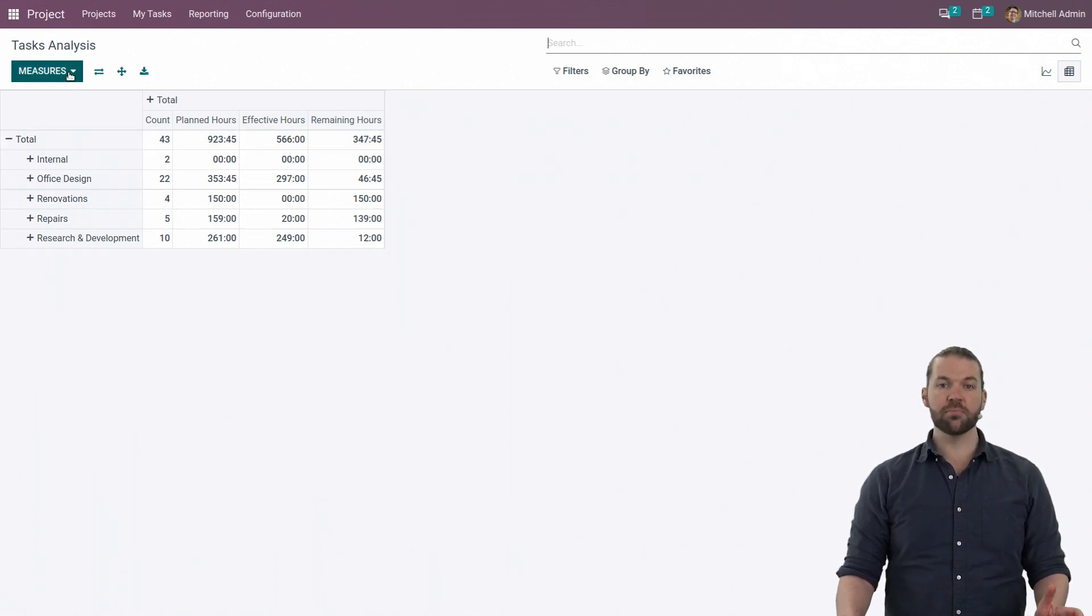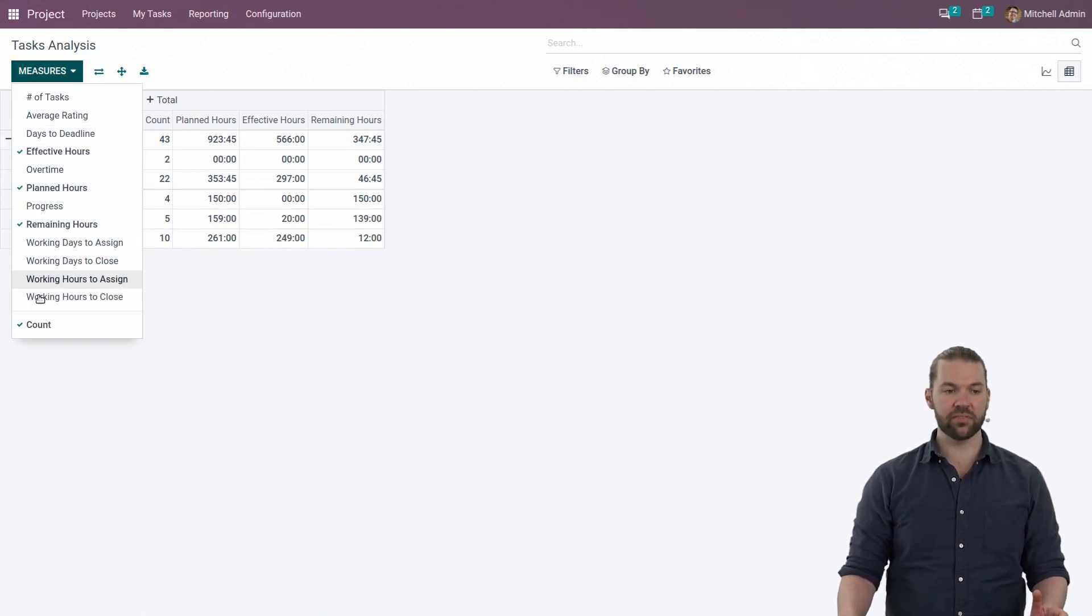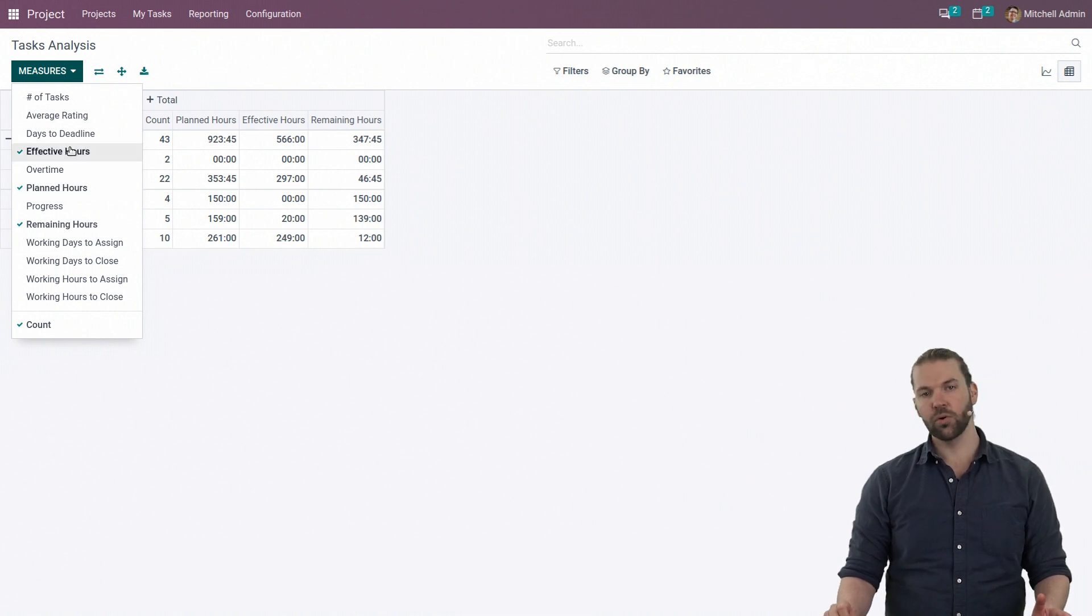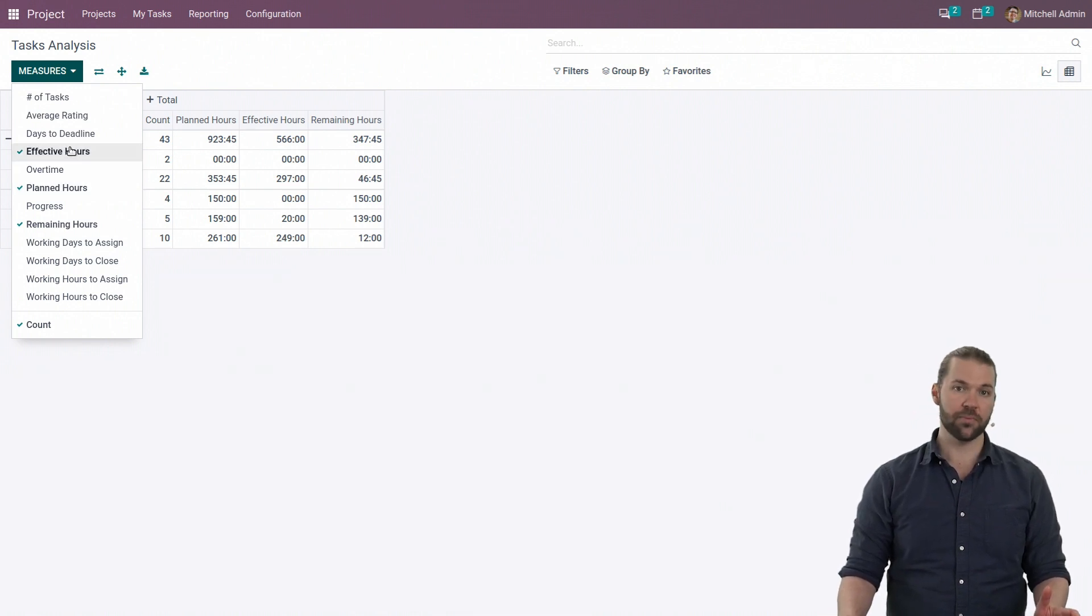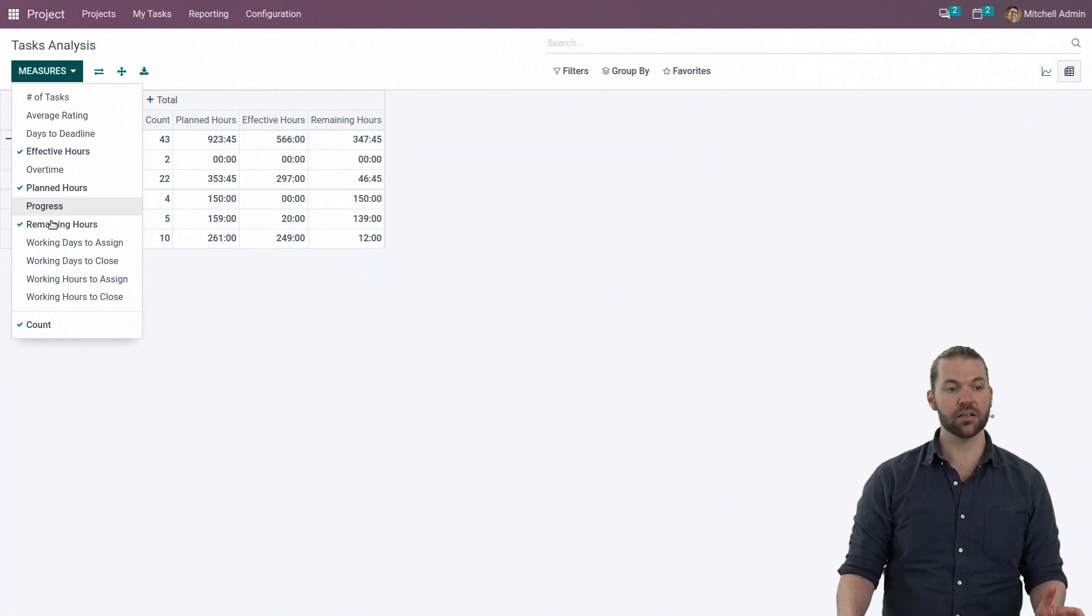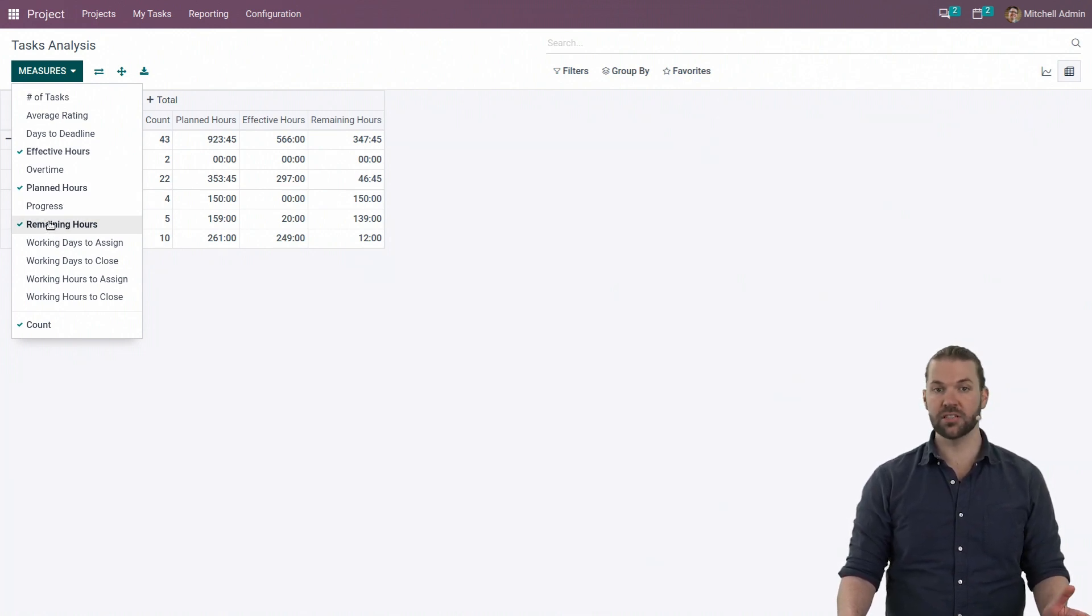First up is the measures. The measure will give us the information we're looking at. For example, effective hours, which will be the amount of time you've logged. We have the planned hours, which is the amount of time you're expected to work on a task, and the remaining hours, which is just the difference.